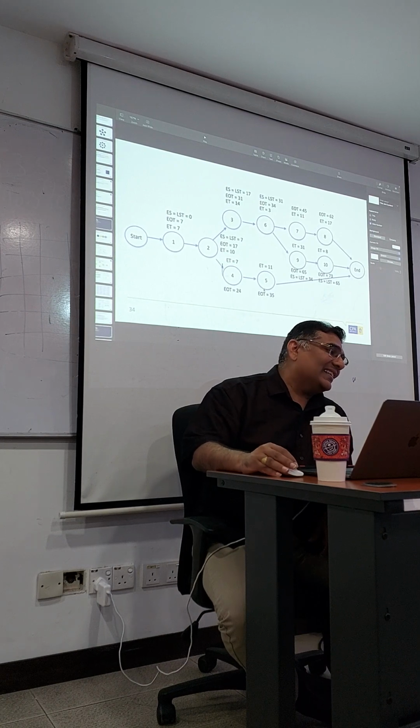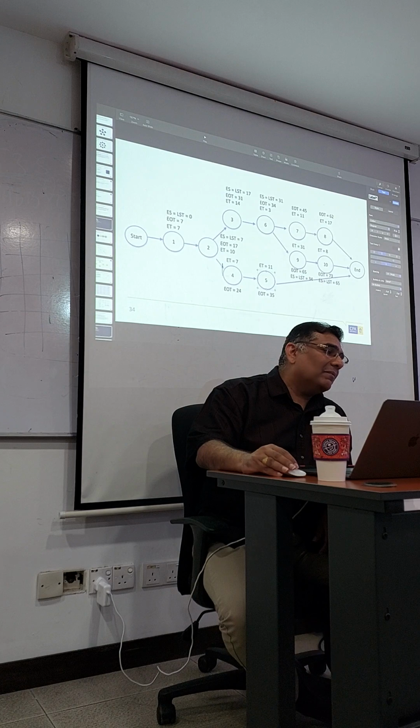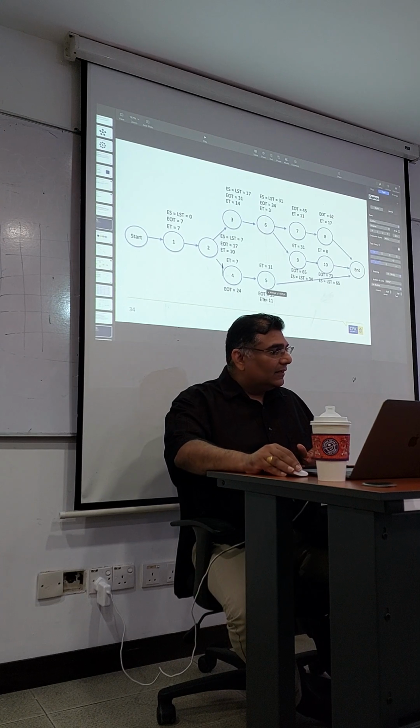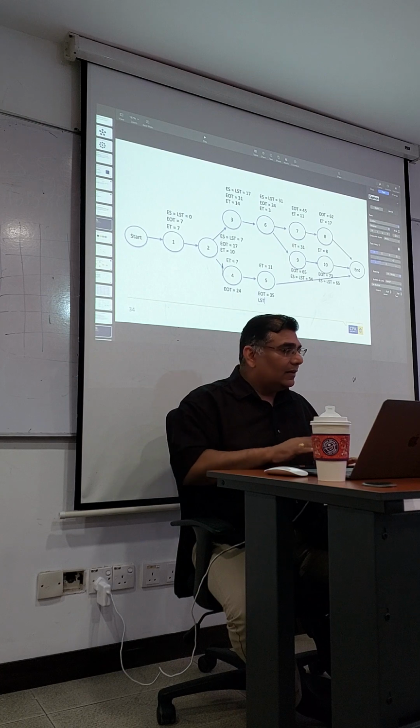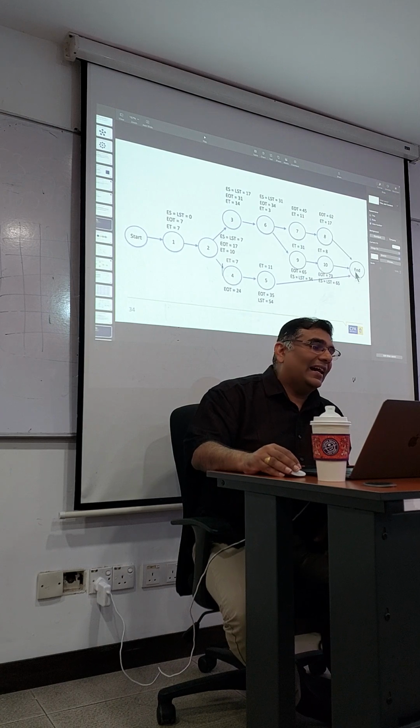So, earliest start time for this one, pay attention. Earliest start time for this one is how much? Okay, now we go backwards. So this one is 73, right? Activity 5. Got slack. How many days? 65 minus 11, how much? 54. So this one, you see, got different. LST is going to be 54 days. If it's not critical, we need to minus lah.